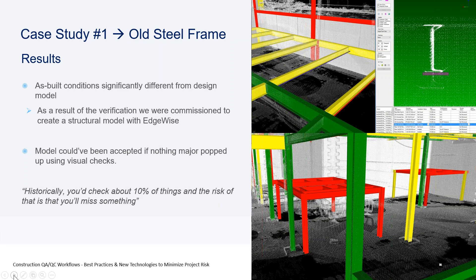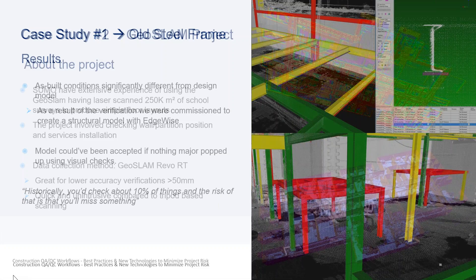There's also a good story here from our office perspective: what the verification proved to the steelwork fabricator was that they needed a fresh model. The design model we'd been given was probably an earlier iteration — there were areas where steels weren't just slightly out of position, but fundamentally different. The red area at the front of the model was effectively a different roof design: it had gone from a double-pitched roof to a mono-pitched roof in what we surveyed on site.